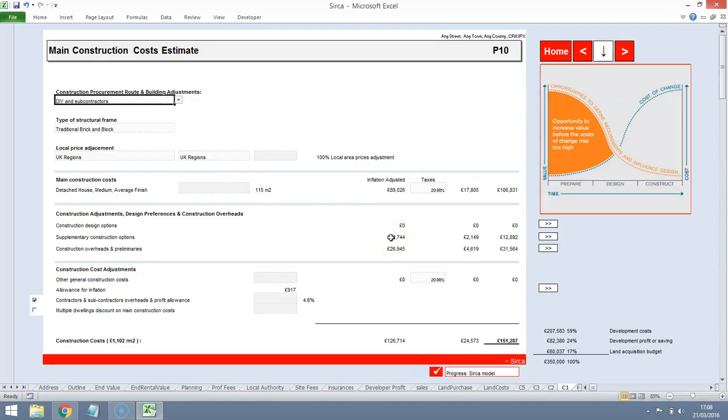Now, part of the reason for the cost increase is to do with the amount of time it takes to develop the property. If you are doing the work yourself, it takes longer to do the work, which means that you incur costs for additional finance. So you may find that you're saving a lot on labour, but it takes you that much longer to actually do the work.